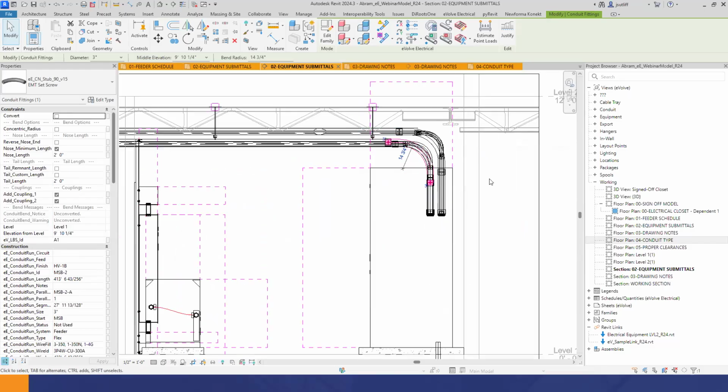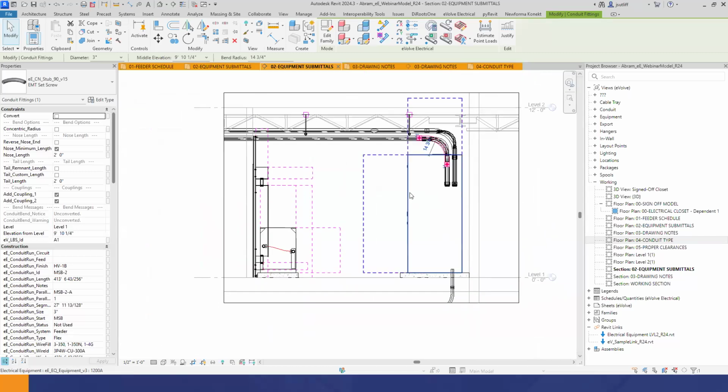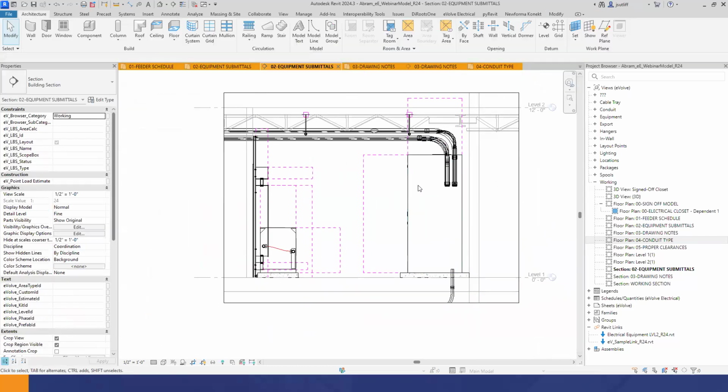So that's something that we need to think about. And that's where having the approved submittals is important. Getting a preliminarily approved submittal, or, drawing a blank on the actual terminology, an early release of a submittal can at least give you a good idea.